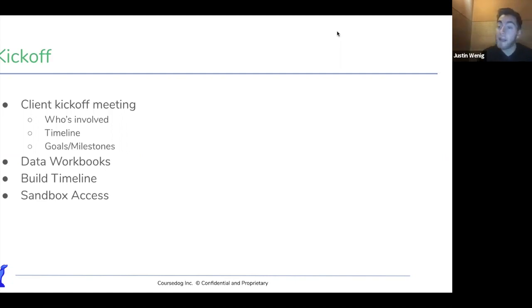So right after the kickoff, once we've defined our scope, what the time commitment's going to be, and then really digging into what our goals for this project are, we immediately go toward talking about data. For those of you that well know, most projects get derailed because of data. Integrations don't work. Data doesn't show up in the right format. Data is the limiting factor to go live, right? If you had all the data in there, usually it doesn't take too long to functionally set things up, although obviously there are some politics involved.